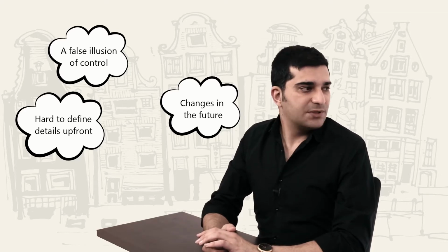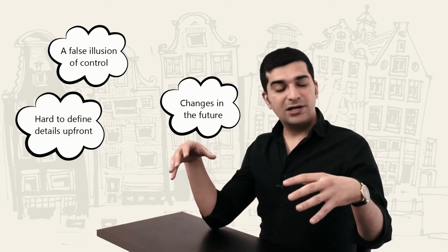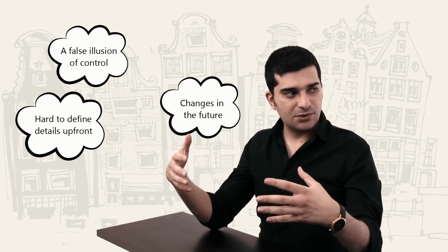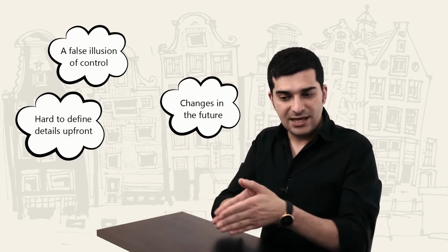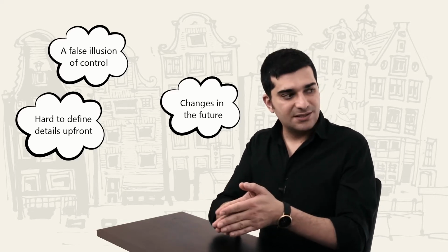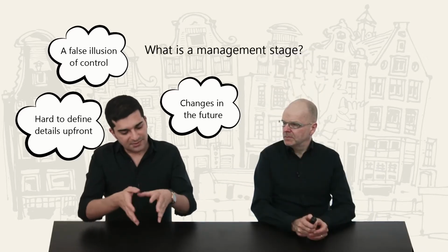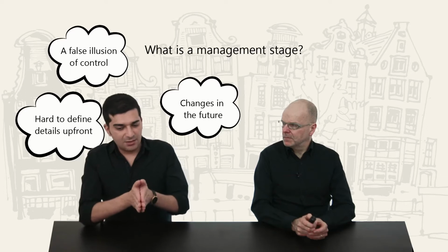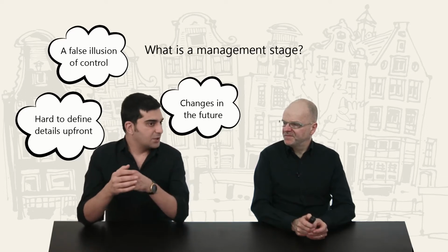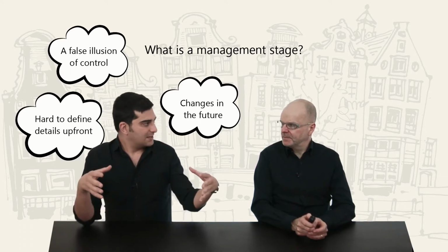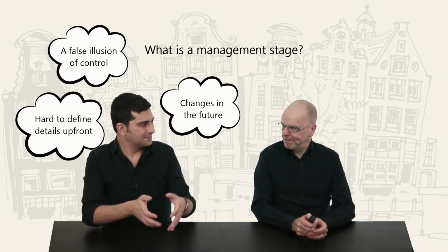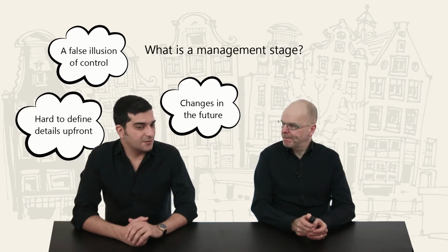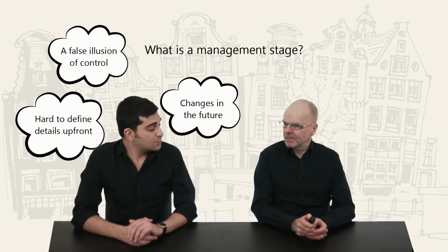In Scrum, for example, we don't have that type of high-level plan. Usually in a normal Scrum project, it's only about the detailed plan that is created in the beginning of each sprint. And even not the whole plan is created in the beginning. But in DSDM, the other agile methodology, we have a high-level plan, and then we create a detailed plan for each iteration. So that's the idea, and it was there in Prince2 to begin with.